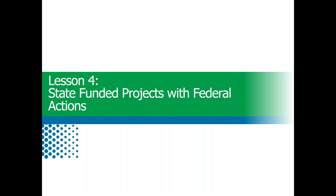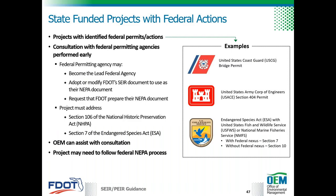In Lesson 4, we'll take a closer look at state funded projects with federal actions. Federal permits may be required for a state funded project and may require the preparation of a NEPA document for one of those agencies. In such cases, consultation with the appropriate federal agency should be performed really early on, and OEM can assist with this consultation if needed. Federal permits or actions may be required by the U.S. Army Corps of Engineers, the U.S. Coast Guard, the U.S. Fish and Wildlife Service, or the National Marine Fisheries Service.